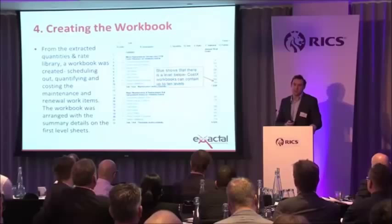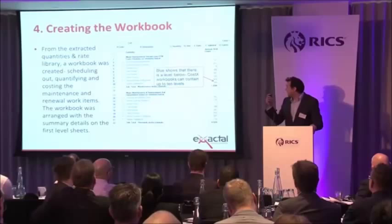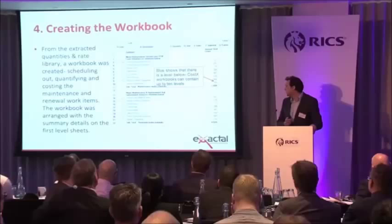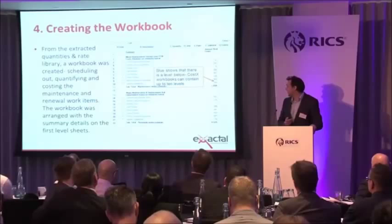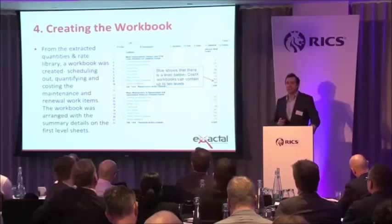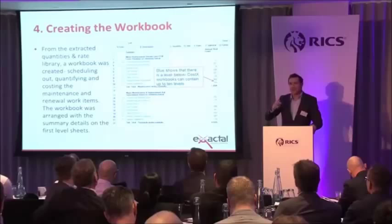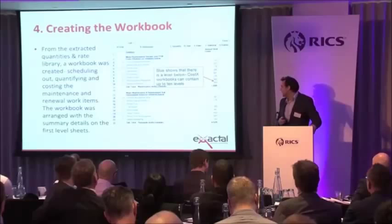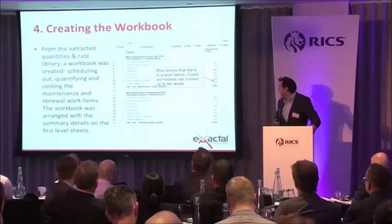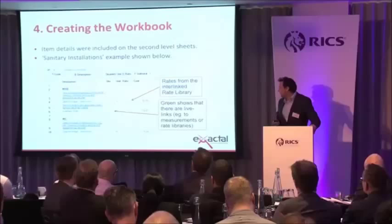What we did with the workbook is we based it on the NRM3 structure. So you'll see at the top we've got minor maintenance items, and at the bottom half of the sheet there are major replacement and minor works items. The elemental breakdown structure is the BCIS elemental structure and NRM3 structure, with applicable elements from 2.6 down through 5.1 standard installations. Costex works on a hierarchical structure — that will be the summary page, but drilling down you get to a more detailed page. This is an example of the sanitary installations calculations.